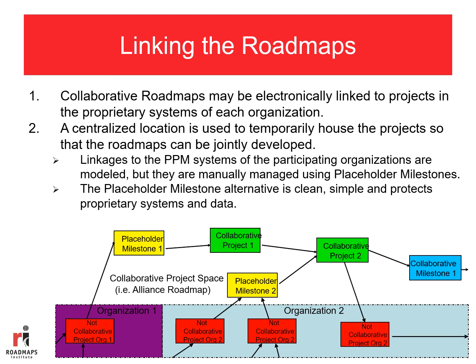And you might have collaborative projects being immediate predecessors to not collaborative projects. In other words, the information going into a proprietary system. However, in this case, you don't need to have some sort of milestone between them, because the data and information on the projects coming from the Alliance roadmap is not protected in the same way as proprietary information internally within an organization itself.